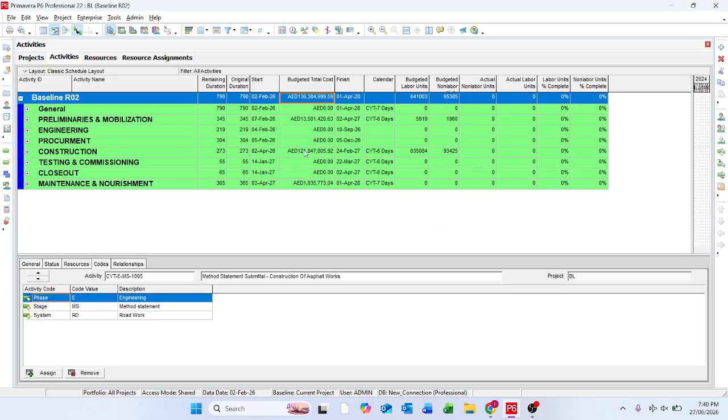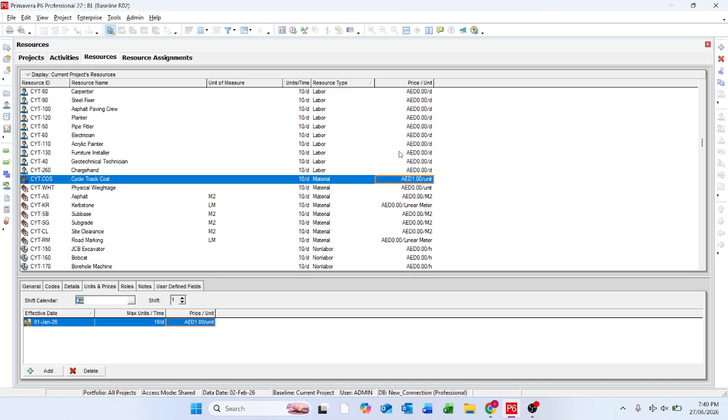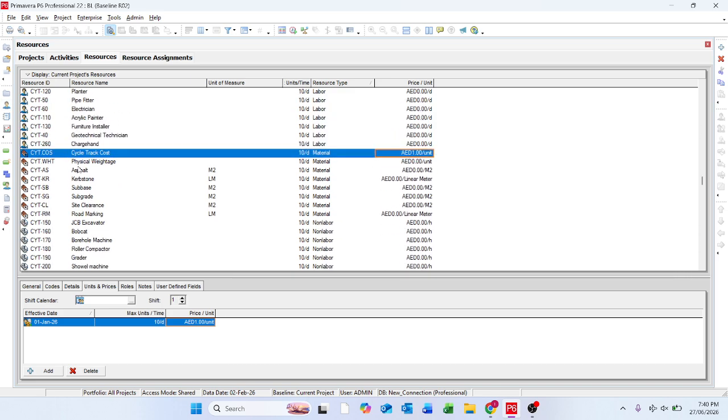You see here it's dropped from 137 to 136. So the physical units are being removed here. So this is the way to fix this problem, and always keep cost as 1 per unit, remaining keep it as 0.